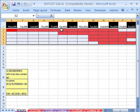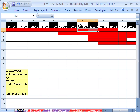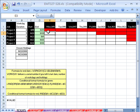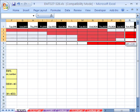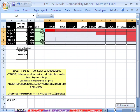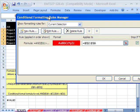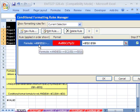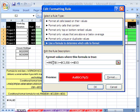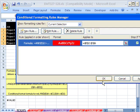But now, on top of the red, we want to add green for Saturday and Sunday. And these are holidays, so we want some green there. We're going to highlight the same range. And this could be a little tricky one. We're going to have to use the same conditional formatting we just used for the red, but we're going to have to add another true false condition that it also has to be true, asking is it a Saturday or Sunday or a holiday.